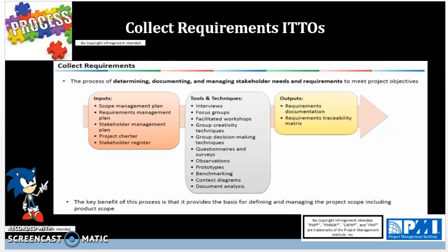Then you have facilitated workshops, which can fall under JAD or Joint Application Development, and QFD or Quality Function Deployment workshops, and Voice of the Customer workshops. Now, a JAD session is a facilitated group technique where SMEs, developers, testers, and a project manager develop, test, and document a small piece of a feature or system.